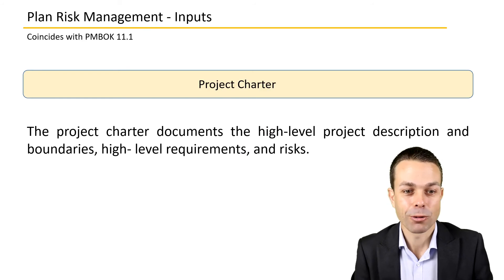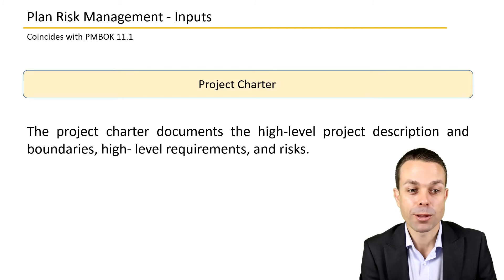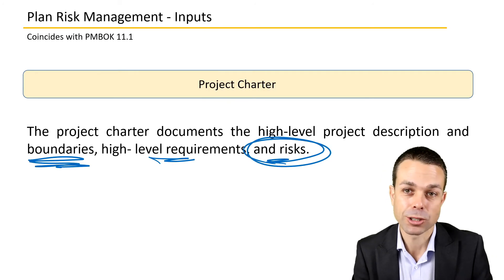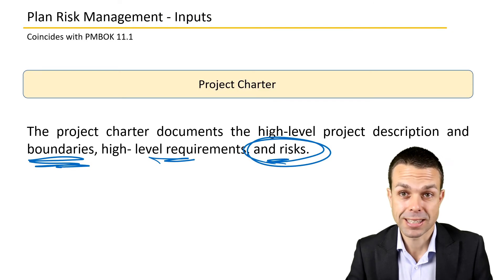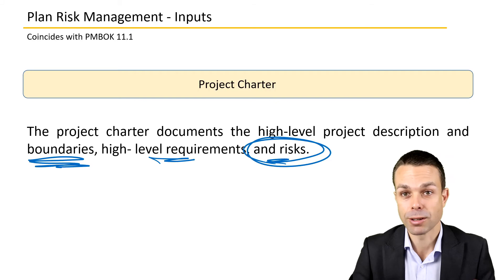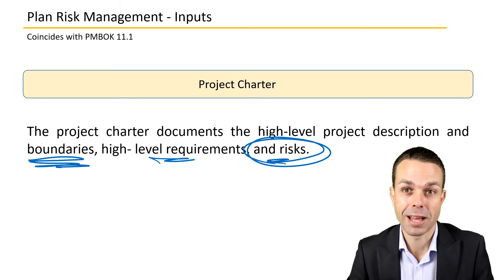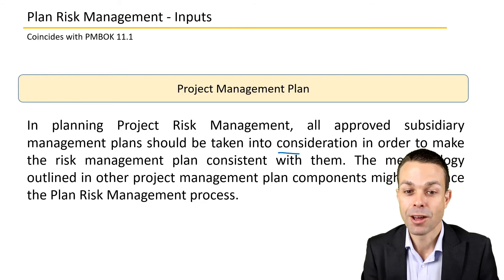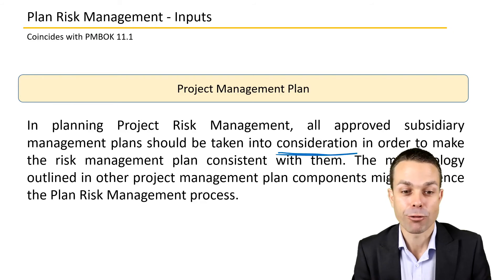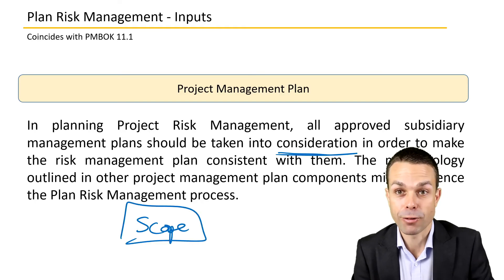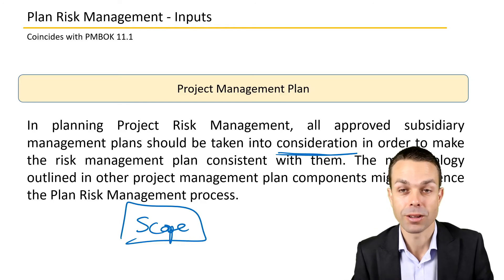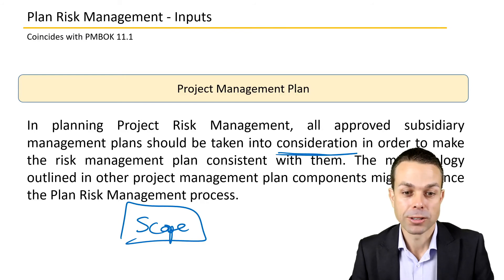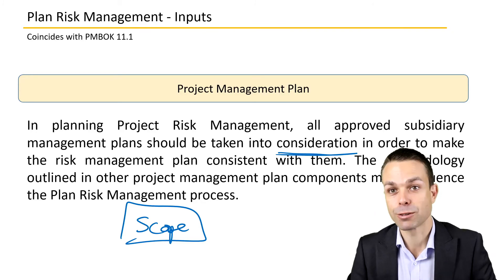Looking at the inputs in more detail: the project charter provides the high-level project description, boundaries, high-level requirements, and high-level risks. In the project charter we should have already called out a brief view of what risks we see coming up, which gives us a nice input into where we should be focusing our risk activities. For the project management plan, all approved subsidiary management plans should be taken into consideration, because risk can come from any place — from the scope, maybe we're designing in a way that invites more risk, or from quality through defects. We need to be aware of all of those things and managing risk from all of those perspectives.